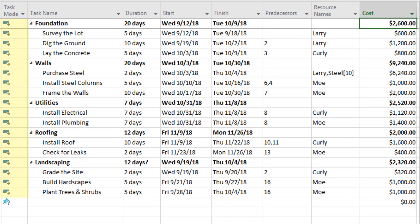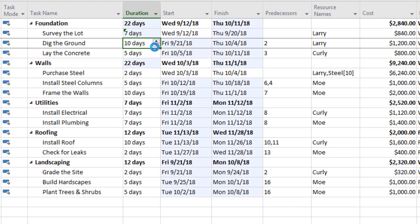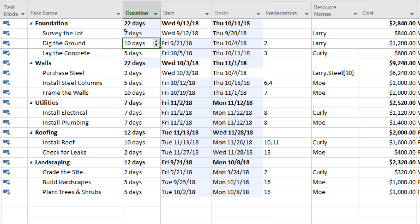Let me revisit the task mode column to illustrate something important. Earlier, we changed the task mode for all activities from manually scheduled to automatically scheduled. Let's say that as we survey the lot, we realize it's not going to take five days but actually seven. Since surveying the lot is a predecessor to lots of other activities, if we adjust that from five to seven days, Microsoft Project will push out all the activities that are supposed to come after it. Rather than going through every line in the project schedule and manually changing dates, the built-in predecessor relationships help us make those adjustments automatically — saving a lot of time as we maintain and update the schedule.